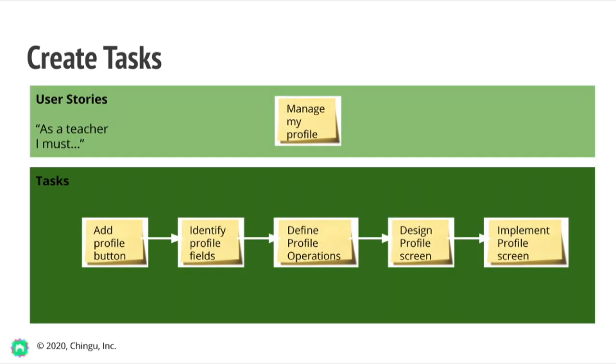The final step in this process is to create individual tasks for each user story. Just as there are multiple user stories for each epic, there are also multiple tasks for each user story. Tasks include elements of the UI/UX that support the story, but they may also include technical tasks such as backend, API, and database work. And just like the user stories, don't worry about getting everything perfect. In fact, don't worry about missing tasks. You'll be refining both the design and any code you create as the sprints progress.